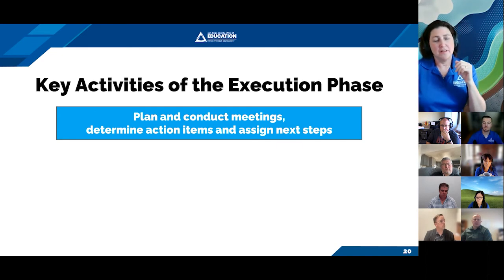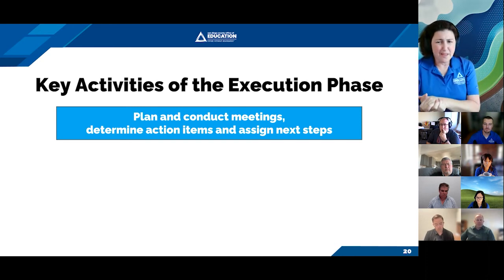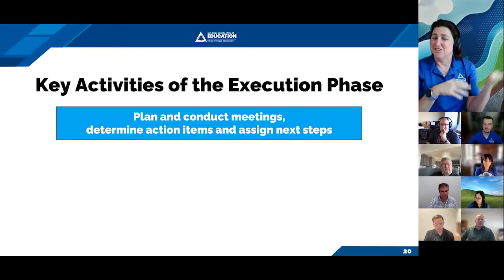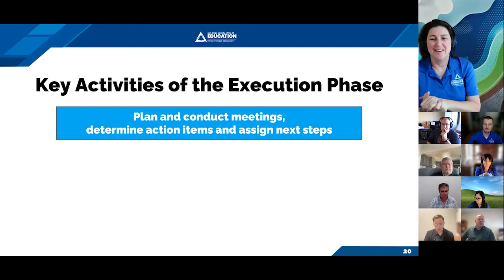And then the other type of meeting that we tend to do is stand-up meetings, and these are generally as needed. They're typically a short daily 15 minutes or less meeting, just to check in, go around the room quickly, see how team members are doing. The typical stand-up meeting questions are: what did you do yesterday? What are you working on today? And are there any roadblocks in your way?